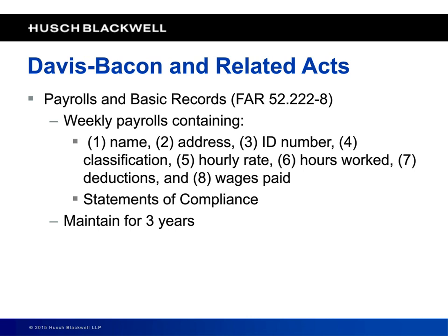Now, I've been asked the question before, and I've actually researched this. What does 3 years mean? Does that mean 3 years from when the record was created or 3 years from when the project's done? The answer to that is there is no answer. So my recommendation is that you keep it for 3 years from contract completion. So if you have a construction project that drags on for 5 years, you need to keep those records generated in the first year 3 years after contract completion. At least that's what I would recommend as a best practice. It's not that much additional burden to keep the records around, and it avoids a potential problem.